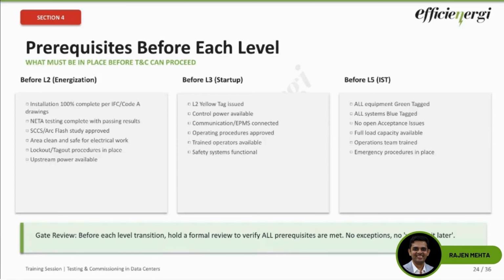So before each level of transition, hold a formal review to verify all prerequisites are met. No exceptions. No, we will fix it later. We should not be going into it that way.